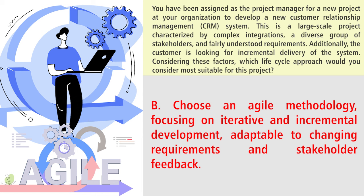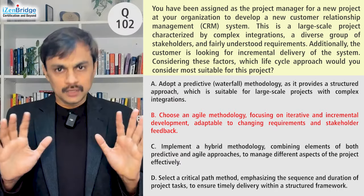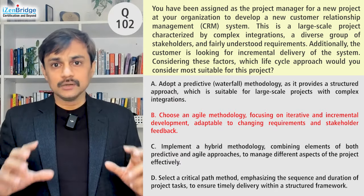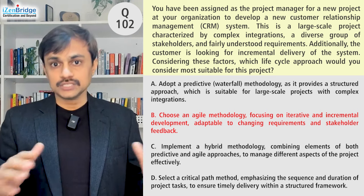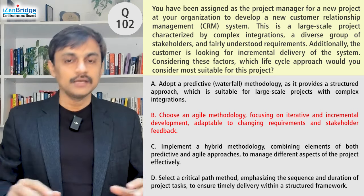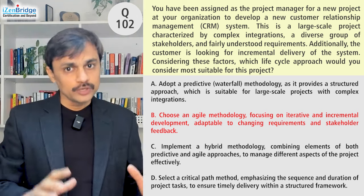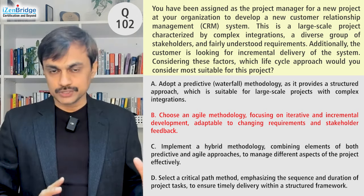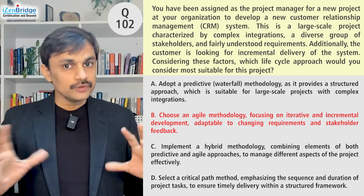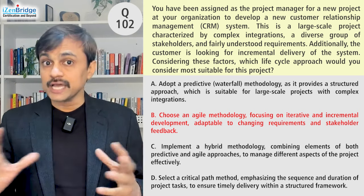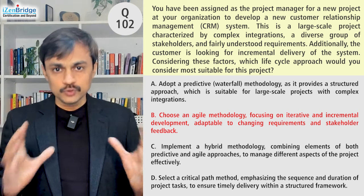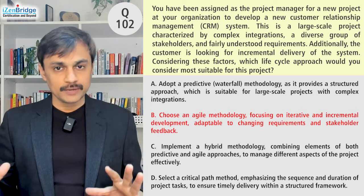Option B: choose an agile methodology focusing on iterative and incremental development, adapting to changing requirements and stakeholder feedback. This is a good idea in general, but the question clearly states it's a complex project with a diverse stakeholder group and fairly understood requirements. If you recall the agile suitability filters, in a complex and large environment, going purely adaptive may not be suitable.